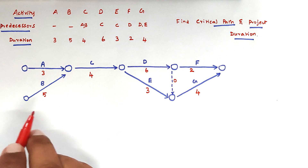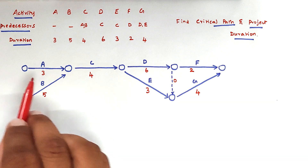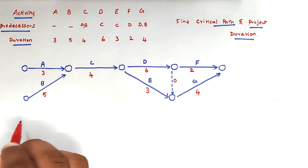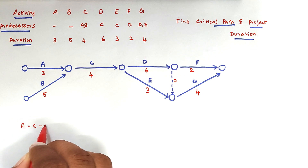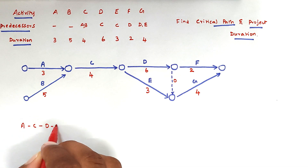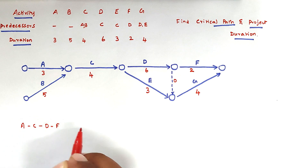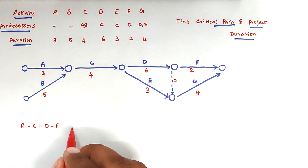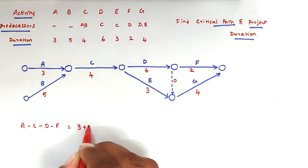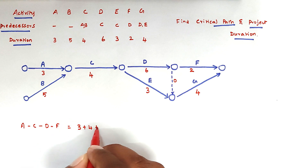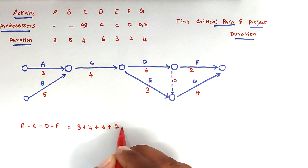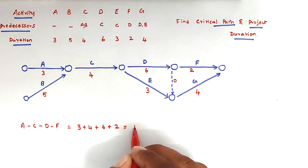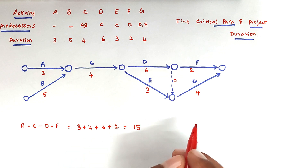Now we can write the different paths. The first path is A, C, D, F with a corresponding duration of 3 plus 4 plus 6 plus 2, which equals 15.